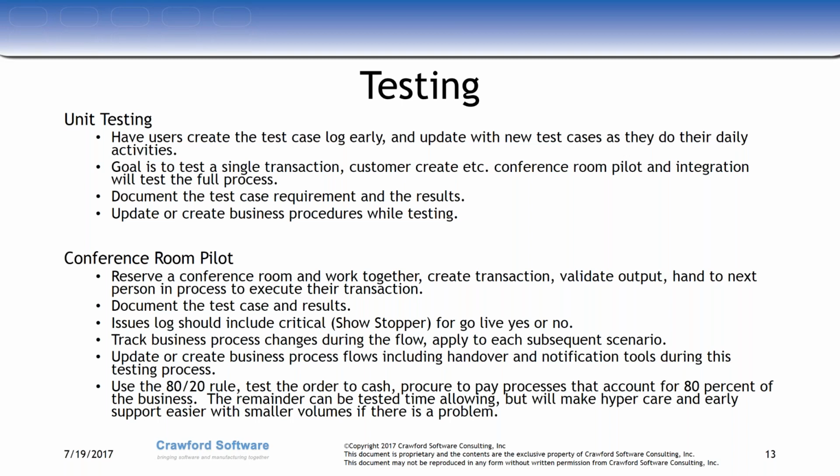And you've got that opportunity, while you're creating that issues log, to identify those items as, are they a showstopper, or are they a go-live, no-go type of situation? And those become the critical items that, if it requires rework from the developer or whatever it is, you have to address. Ideally, by this point in time, we have no showstoppers. We might have run into a couple of small form changes or small other things, but hopefully we have no showstoppers.